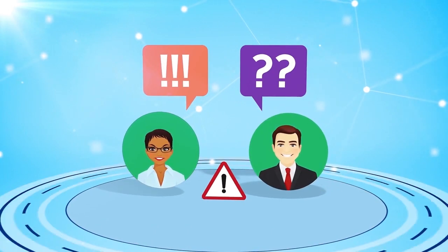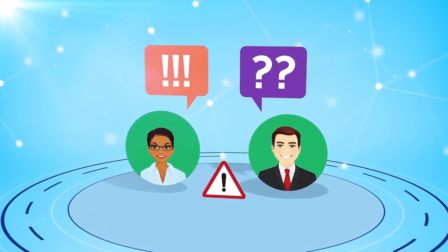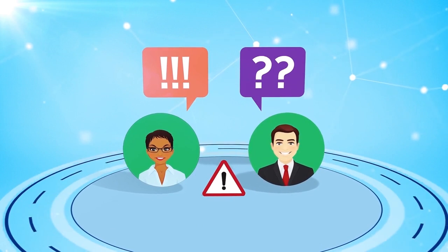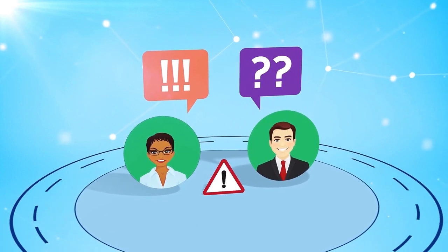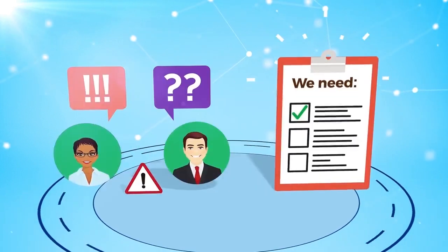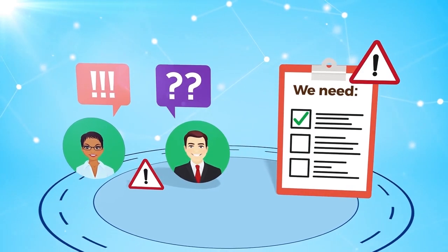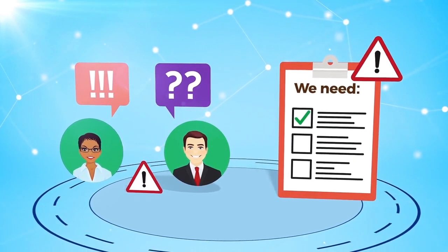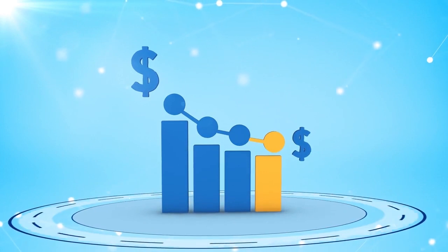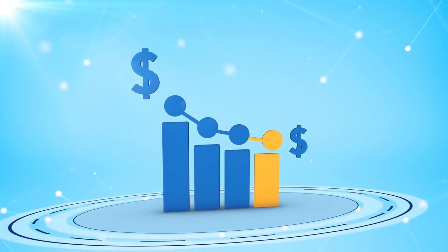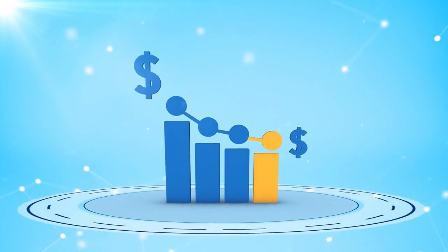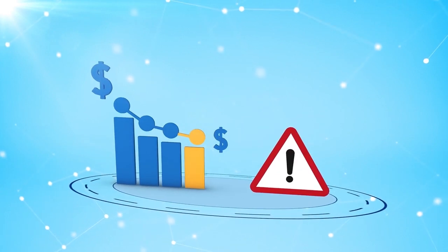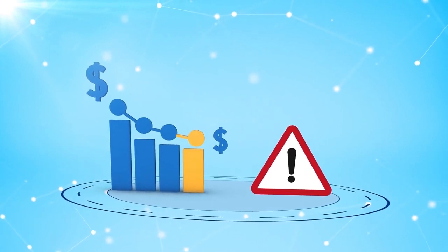Having a definition of done also helps to limit misunderstandings and conflict that could arise between the team members or the team members and the product owner by not having a clear and communicated list of criteria from the very beginning. It also limits costs of rework, for example, as it leaves no room for surprise because some criteria is missing that wasn't discussed or documented in definition of done.